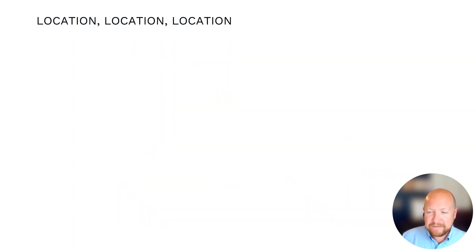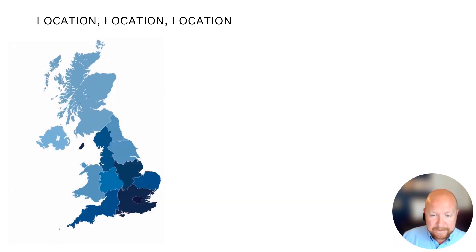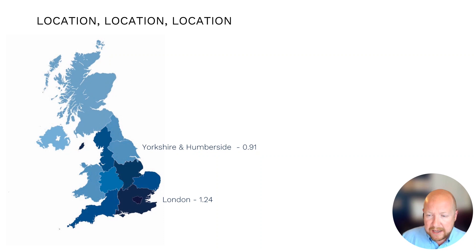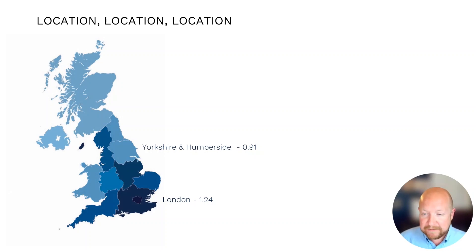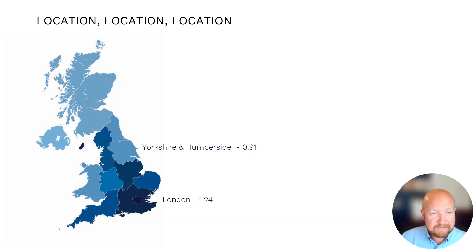Another way in which the environment we are working in can impact costs is, of course, where we are in the country. BCIS produces location factors which can be used to adjust project estimates according to where the work is actually taking place within the UK. These figures, calculated for our 24 estimating guides, show that there can be a significant difference between the average cost in different areas of the UK. But even within a geographical location, the specific setting of the project has a huge influence on costs.